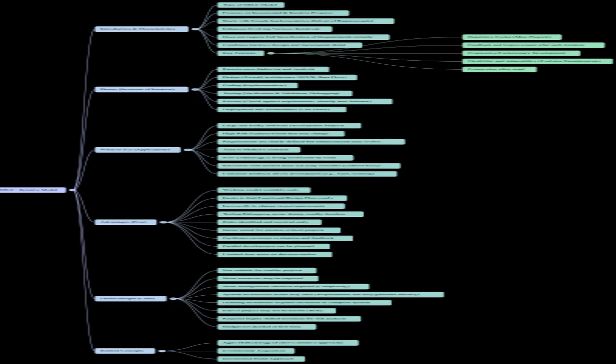Honestly, the success of this whole model really hinges on rigorously validating the requirements for each piece and then verifying and testing every single software version within its cycle. You basically can't, or shouldn't, move on to the next cycle until the current one is properly validated. And it gets even trickier, right? Because as the software evolves, cycle after cycle, all those tests you wrote for the earlier parts have to be run again, repeated, and even extended to make sure the older, established bits still work perfectly with the new stuff you just added. Exactly.